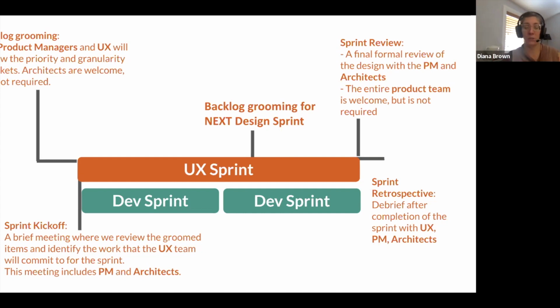So we could prioritize work at the beginning of our UX sprint if we thought it was going to influence their dev sprint. This was how we were going to begin. It wasn't the end goal and it wasn't how we stayed, but it was how we started, as development figured out what worked for them and we figured out what worked for us. We had separate backlogs because that was the preference of that development organization. But each backlog was product team specific, so there were parallel backlogs, if you will.